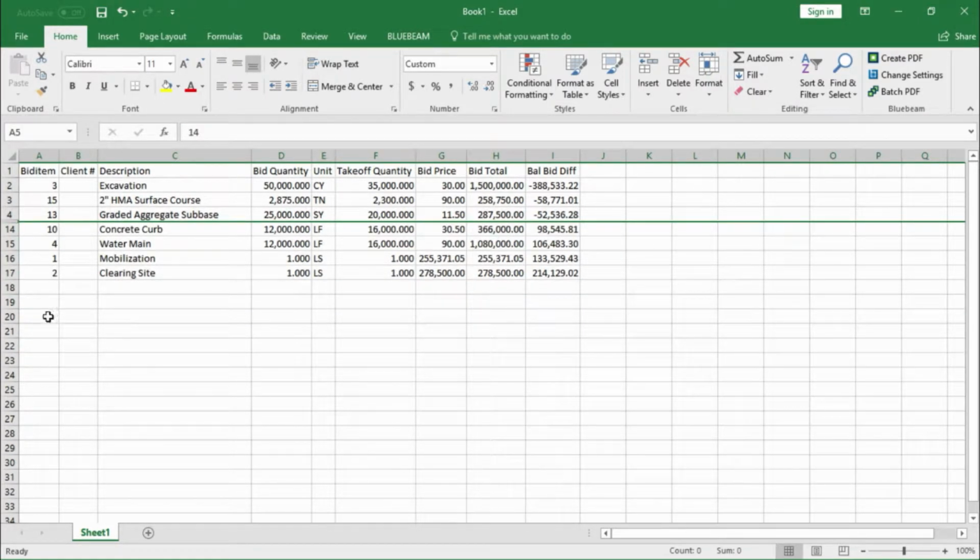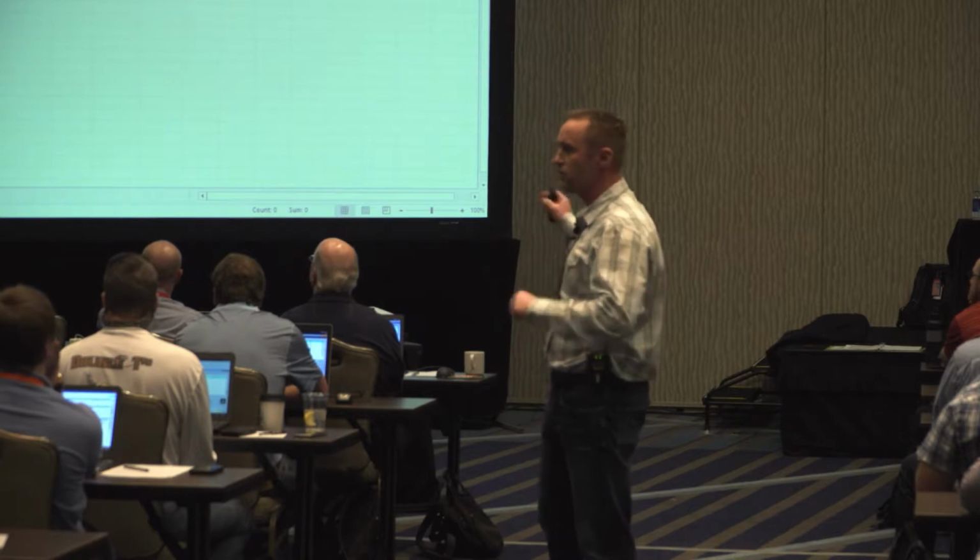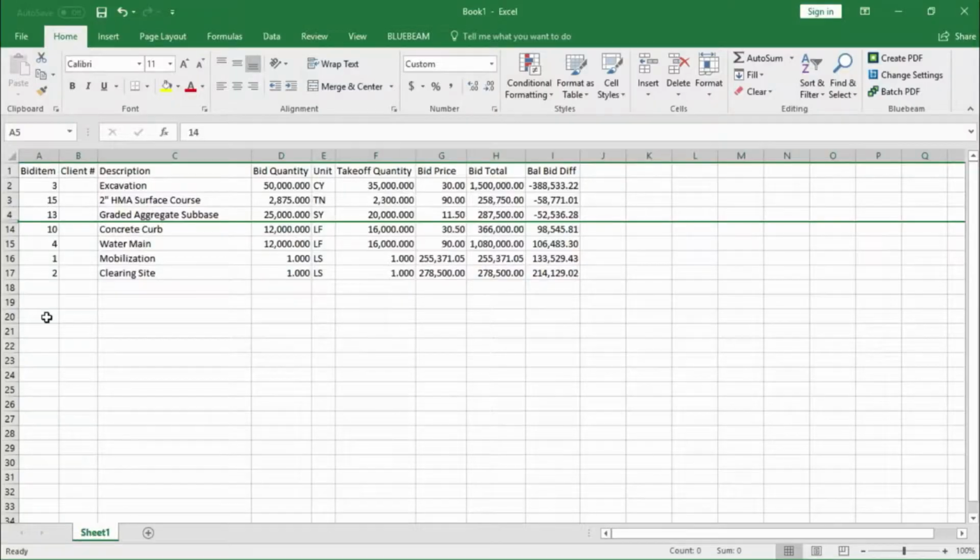There is a quick unbalancing report. Send it out to everybody that worked on the estimate or anybody that was involved in the review, and you say, this is where we've moved the money around. Does anybody have any concerns with how we've moved this around? And you wouldn't believe how a little conversation like this goes. Someone says, the method of measurement and basis of payment on this I don't like, so I don't want to put all that money in there because they're not paying us for the excavation, the slope back on the foundation excavation. Cool, I agree with you. Let's bounce that back, let's put money somewhere else.